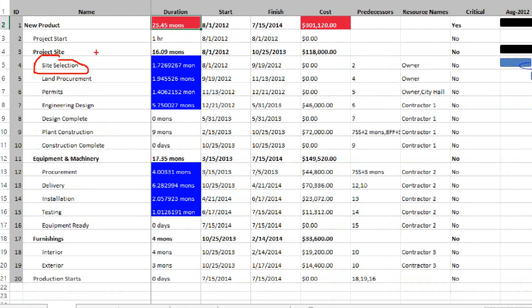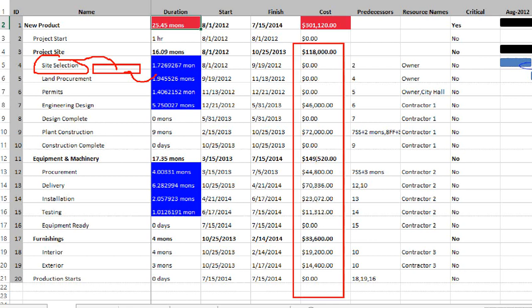So if the risk occurs, a task is going to be generated on the fly here. So this is going to be like that, right? And that task is going to take 2 days and it's going to cost us $51,000. You will see here that this project that I have here is resource loaded with money as well. So you will see changes in the total cost if the risk occurs, right?